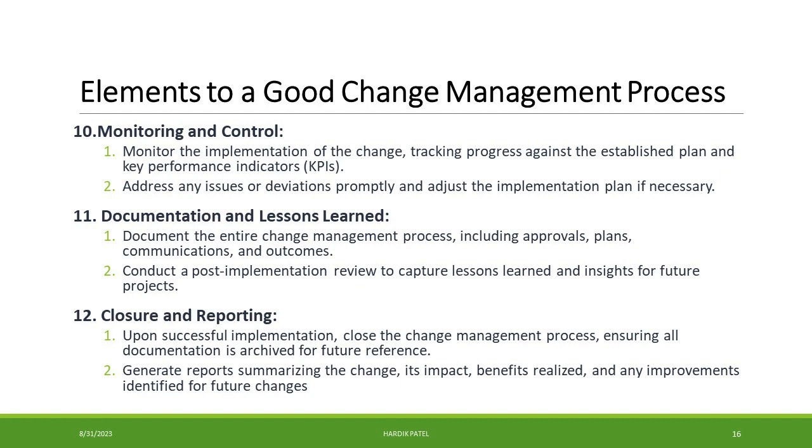So, upon successful implementation, close the change management process, ensuring all documentation is archived for future reference. Generate reports summarizing the change, its impact, benefits realized, and any improvements identified for future changes.